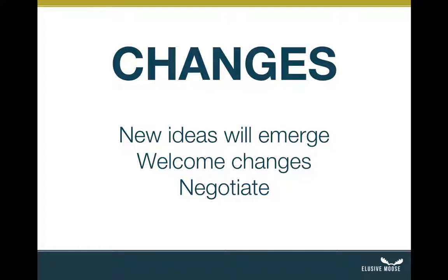The second thing I might do is, if I'm tracking ahead, if I'm doing really well and I'm realizing that we've got good chemistry here, my estimates were conservative, and we're beating the budget in a significant way, I might bring one or two of those in. Nothing says happy client like, I'm just going to throw that in, we're going to take care of it, it's still going to be part of that same budget. No, I'm T&M, so I'm still going to get paid to do it, right? But it's an expectation thing.